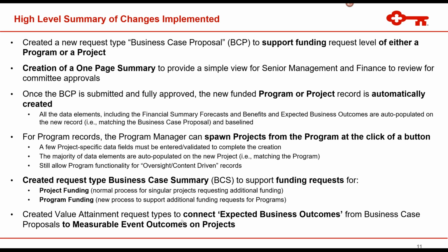And then as part of that business case proposal, we also created a one-page summary to provide a simple view for senior management and finance to review these funding requests for committee approvals. And it's available for both the business case proposal for the initial request of funding, as well as additional requests for funding. So for our business case summaries, which are supplemental requests after the project has entered planning.